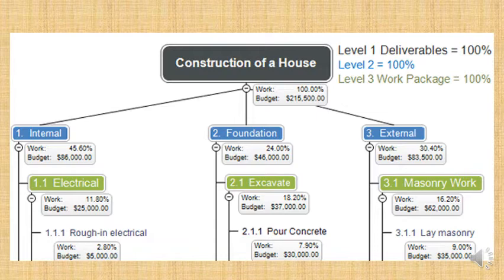So you can see here that with the work breakdown structure, we've analyzed each work package, we've worked out what work needs to be done, and we've built a budget, a cost for each item. And we may have tendered out some of that work, we may have done detailed estimates, we've probably worked out a bill of quantities, how much land is being excavated, for example, and what is the rate of hire for an excavator per hour, and so forth. And anyway, we've come to a budget.